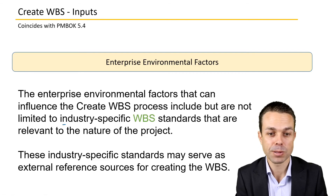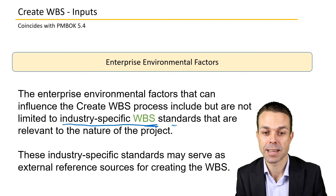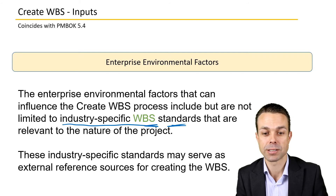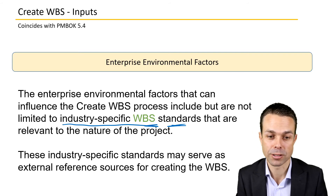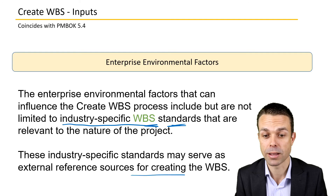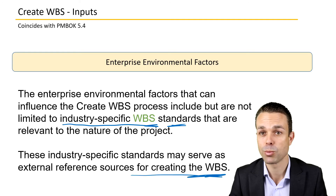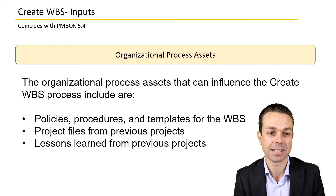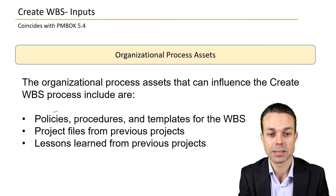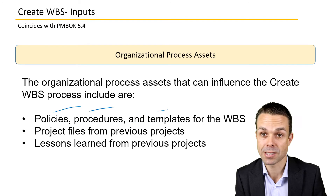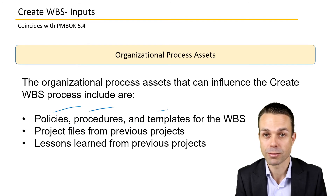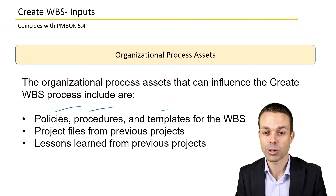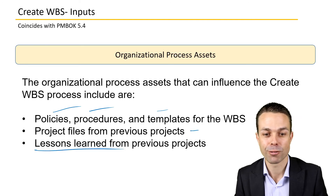Enterprise environmental factors may include industry-specific Work Breakdown Structure standards or standards within your organization. These may serve as an external reference for creating the WBS — more of a how-to guide covering any standards we need to follow. Organizational process assets and templates might include policies, procedures, and templates existing within the organization, project files from previous projects, and lessons learned from previous projects that you can use to help break down the structure.